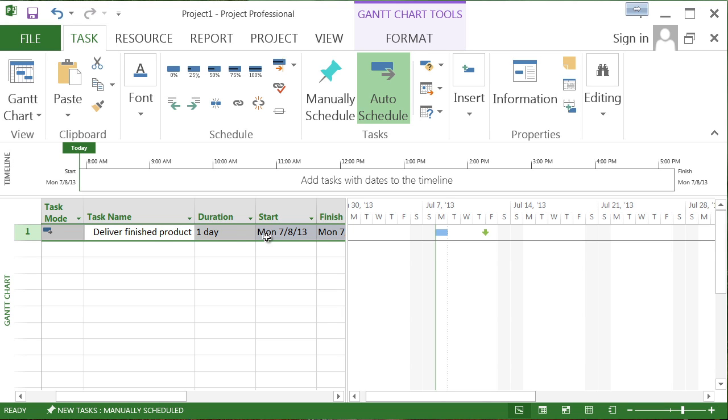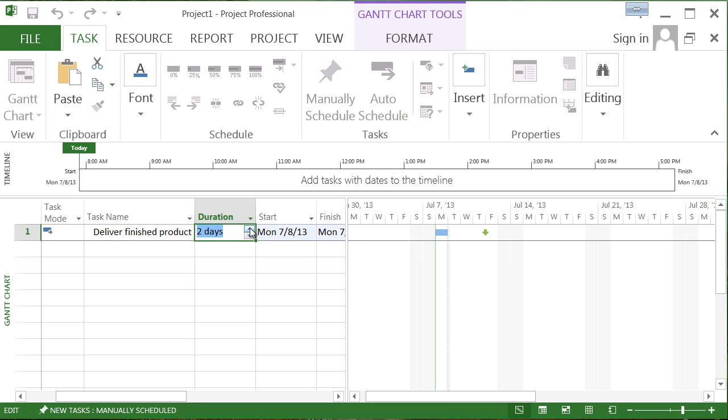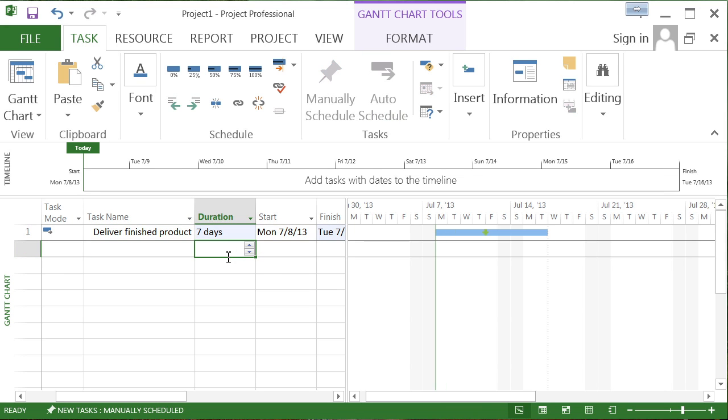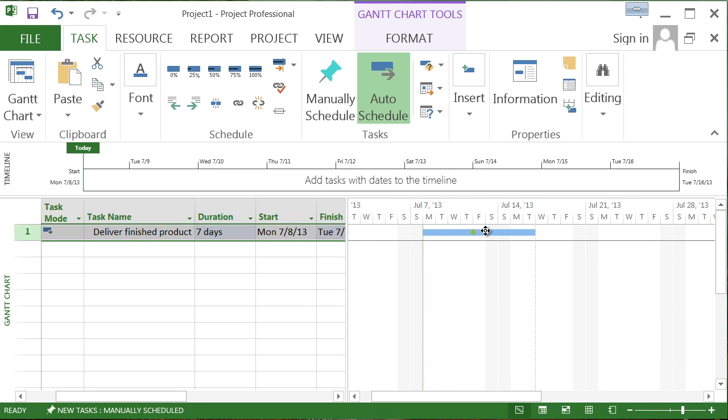If we should go over this deadline, like this thing ends up stretching out to seven days, the deadline marker here is going to indicate for us that we've gone over deadline.